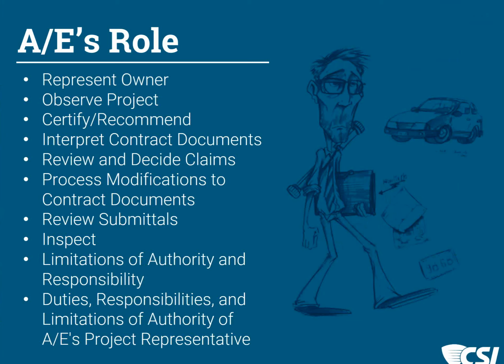And then you are also certifying and or recommending. For example, in North Carolina, you certify applications for payment. In other places and in other contracts, for example, EJCDC documents would say that you recommend application for payment. So this is one of the roles that we have on the project. And in the end, we are issuing certificates of substantial completion or final completion and certifying that the project is ready to be paid for.